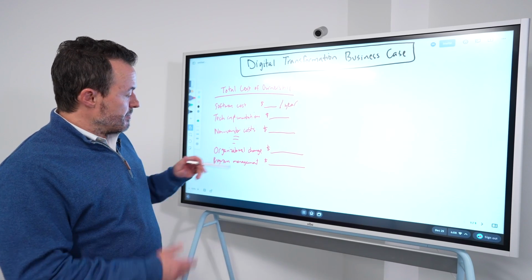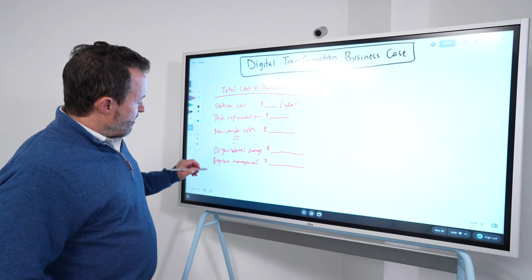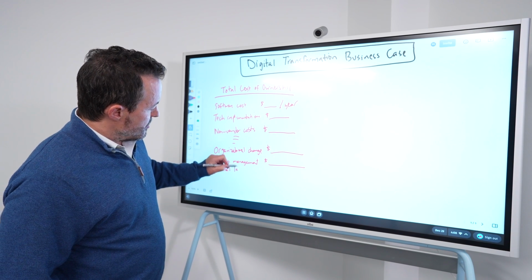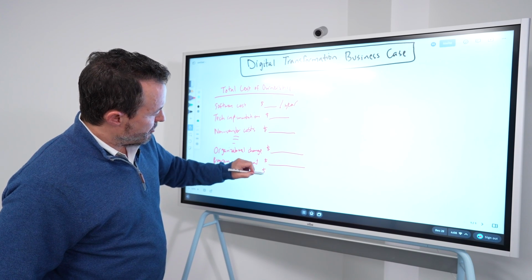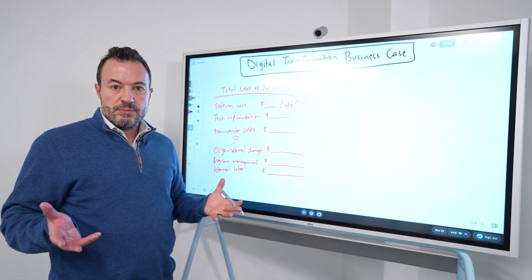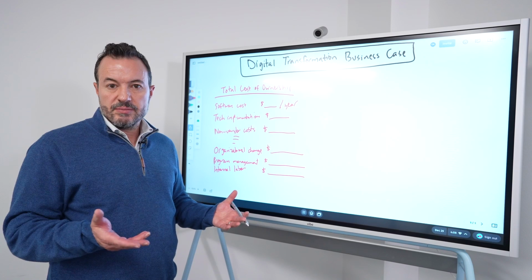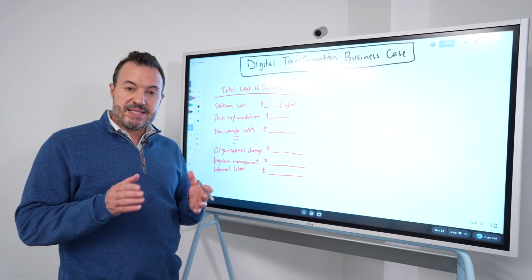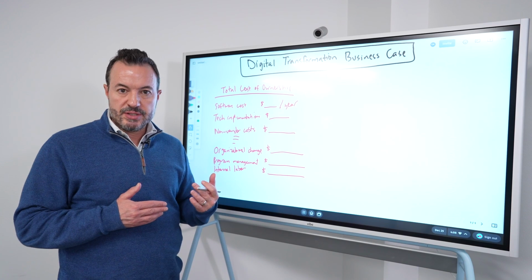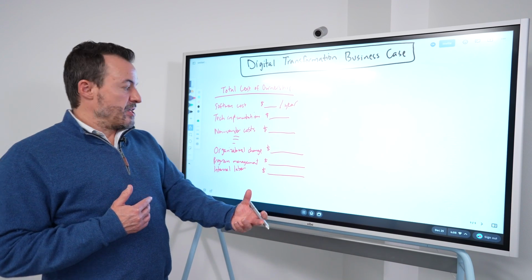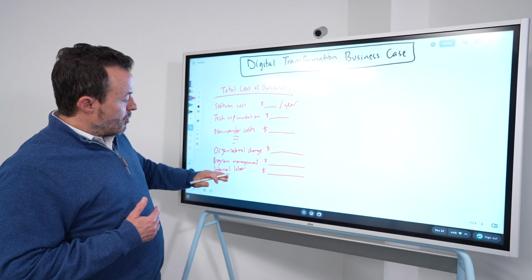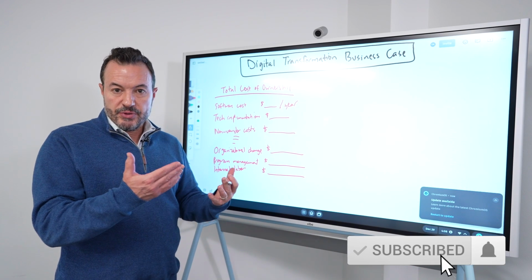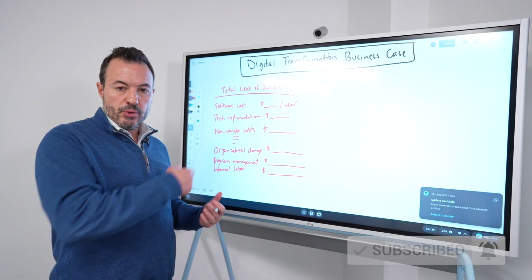And so that's another line item that's commonly overlooked. And then a final one I'll add here is the internal labor. Oftentimes organizations will find that they don't have people just sitting on the bench doing nothing that they deploy on an internal digital transformation, but instead they end up having to backfill those resources by hiring more people to potentially either support these line items here or to help the internal resources that are supporting the project do their day-to-day jobs while they're supporting the project.